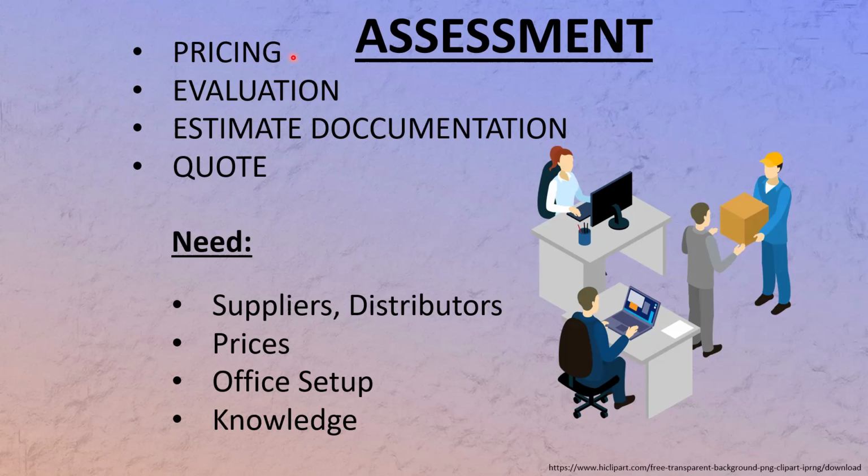Based on the survey notes, you will be able to tell how many man hours you're going to need for the job. And based on the man hours, you can really mess things up, because for the man hours you charge, I'm not sure, maybe $90 per hour per person, and then you pay the person $28 per hour, and the rest goes to the company.